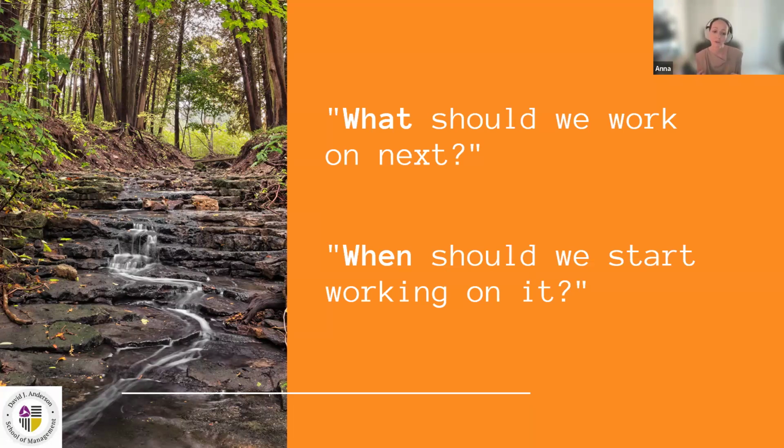And this is the question we can answer using information about our lead time, so how long it's going to take for us to deliver this work. And this is the question that we can answer using information about cost of delay, so how much it's going to cost us if we delay it, or if we don't do this today versus something else. So we answer this question understanding our system, our lead times, our metrics. These are the two main questions that we ask ourselves and our clients while making decisions about the items in our process at the commitment point.